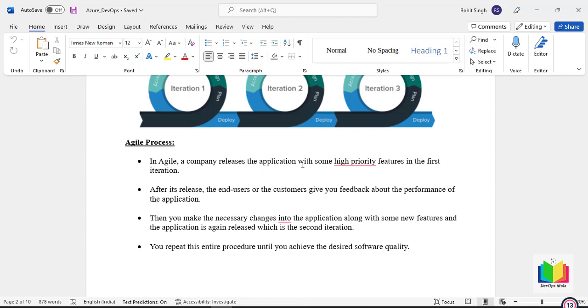The feedback loop which was missing has changed the whole paradigm. Previously in the waterfall model, we used to develop the entire application, then present it to the client, then the client says, no, this is something I was not looking for. You have built something else. I want a fat animal, and you're building a slim, trim, and tall animal. This is not what I was looking for. Then the whole team comes back, and again the requirement, the design. It's completely time consuming.